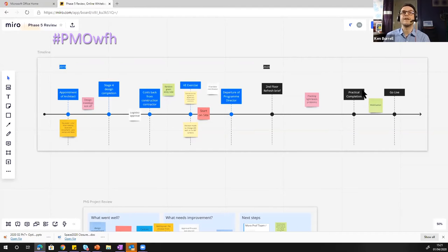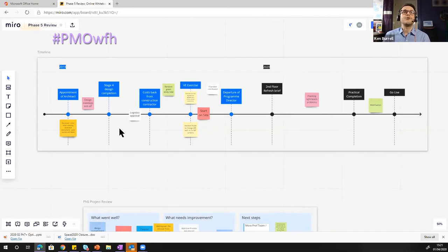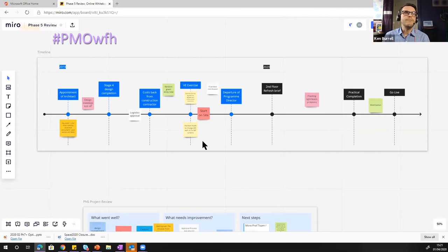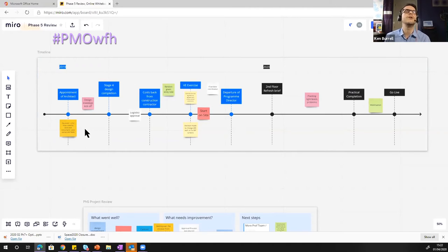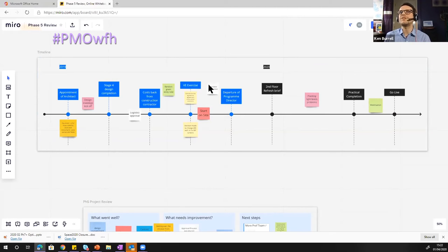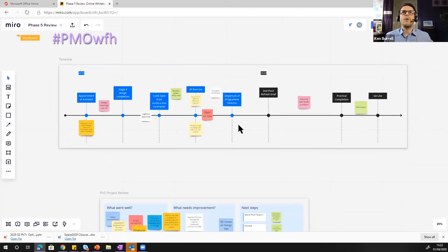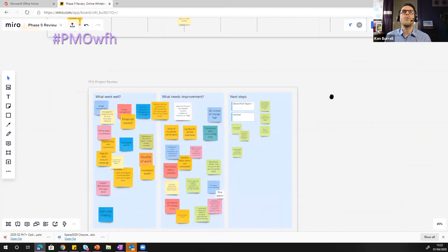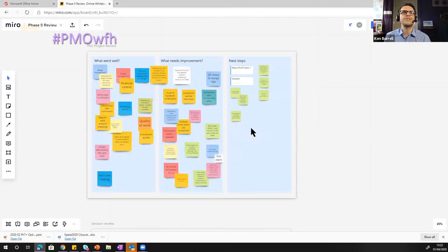They have to create an account and once you're up and running people who are signed in can create these sticky notes and they can move them about. The size of the type on the sticky note resizes to accept what's being typed into it. So we started with this timeline of the project. Then we moved on to what went well, what needs improvement and some next steps.